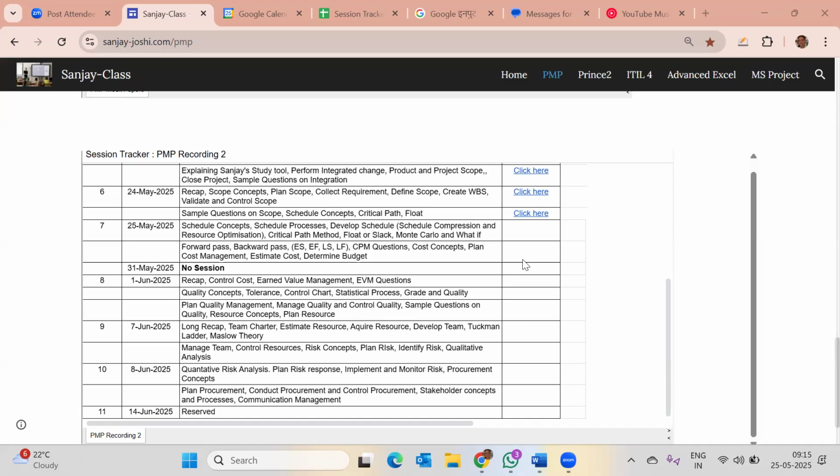But yes, of course, we need to discuss with the product owner. The product owner will decide whether the items continue as the highest priority and can move into the next sprint, or else there is something else coming in between and they can go down. Exactly, that decision will be with the product owner. And obviously for the team, it is a learning basically. In retro, you have to discuss why you failed to deliver those items.